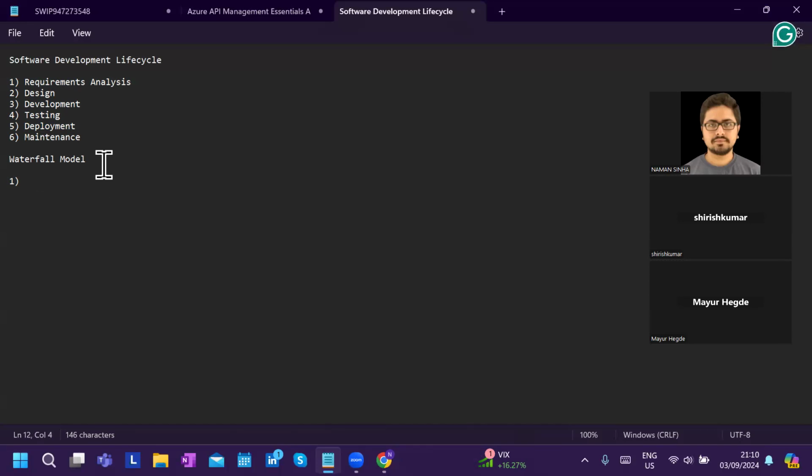Yes, by the time it's deployed, it's already extended, like the requirement is already not being met. Exactly. One thing is, in that 1 year, a lot of things changed, so the requirements became outdated. That's the first thing. Next thing, in the middle, let's say in July 1995, if HDFC comes and says, hey, we want a small change, Fractal would strictly say no. Why? Because the waterfall model does not allow any change.